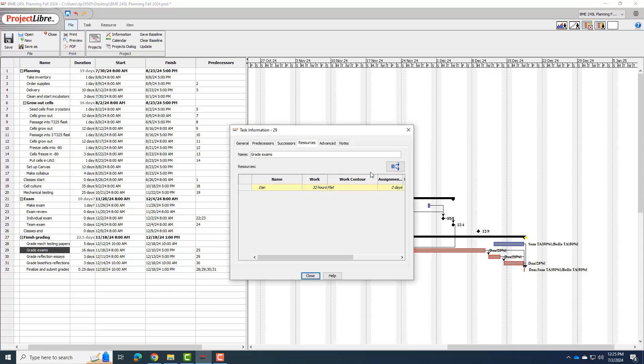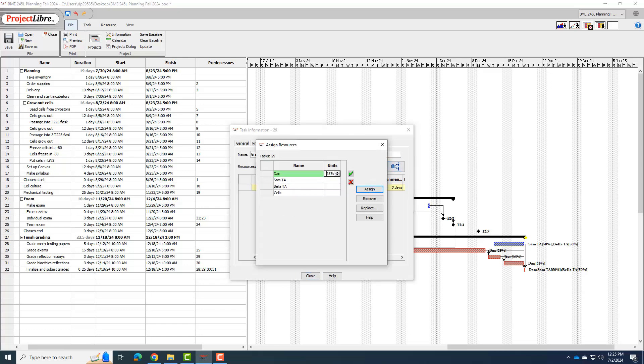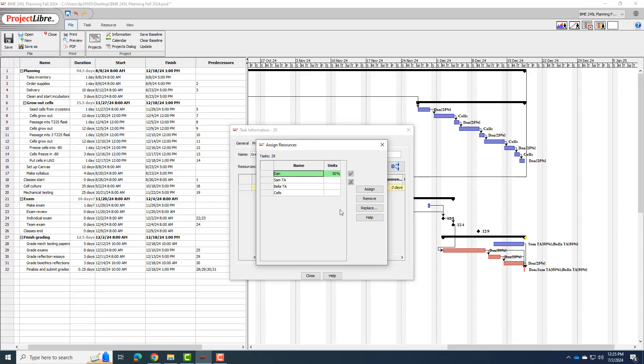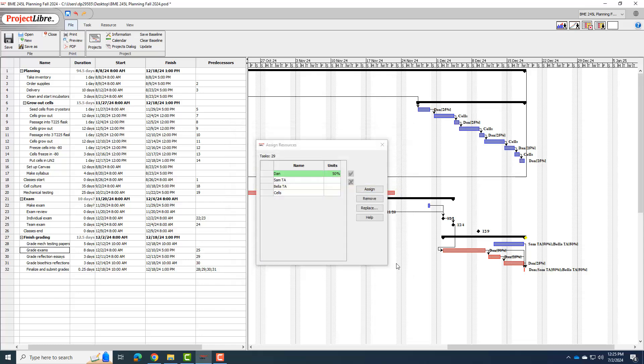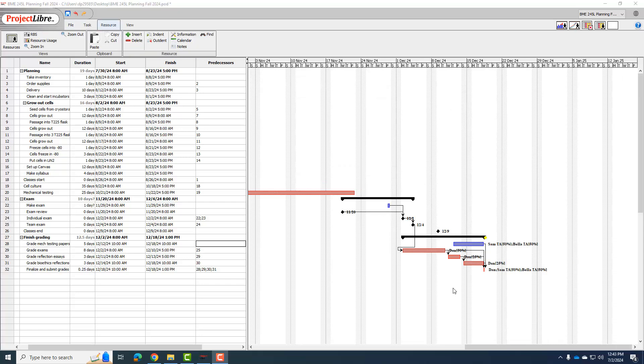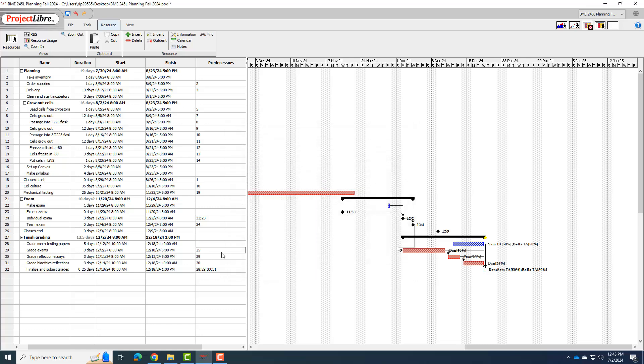I'll start by going to the resources on here, and instead of 25%, I'll go ahead and make it 50%. One other thing I can do is I notice that I right now have grade exams happening after the team exam because my team exam is the predecessor to the grade exams. But really what this is telling me is I can't wait that long. I need to start grading exams as soon as the individual exams get done. So I'm going to have to change my predecessor from team exam on line 25 to individual exam on line 24. And that now makes this work where I can have that Monday evening where I will have to start grading. And so again, that's what planning does for us. It helps us understand what we're going to have to do, when we're going to have to do it to get the project done on time.